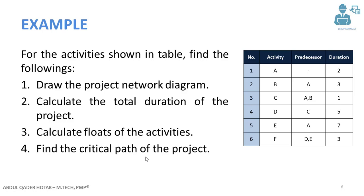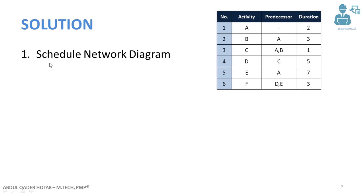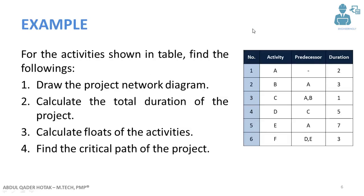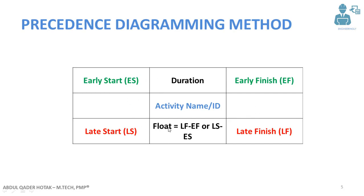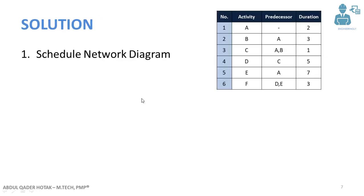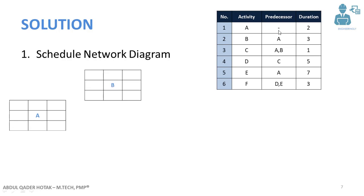Let's go step by step. For the network diagram, I have left the table visible so you can see and understand what I'm doing. First we have activity A — we will draw each activity with its details in the node. Activity A has no predecessor, meaning there is no activity before it. Activity B's predecessor is activity A, so we connect these two activities. Next we come to activity C — its predecessors are A and B, so we connect it to both.